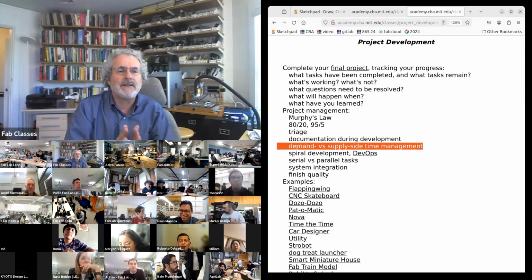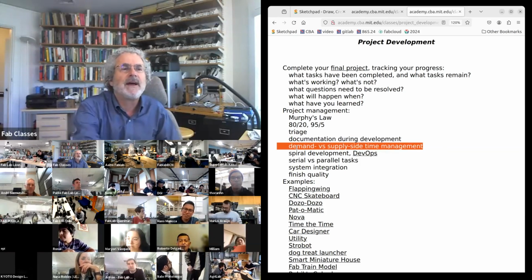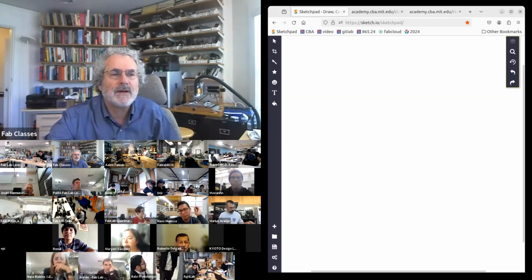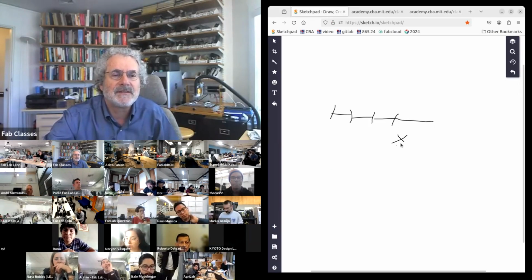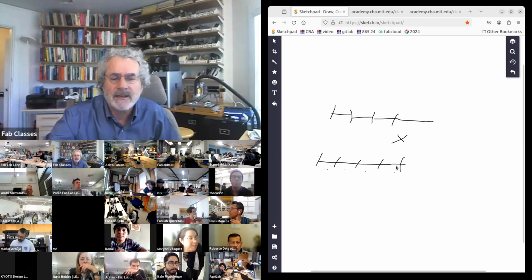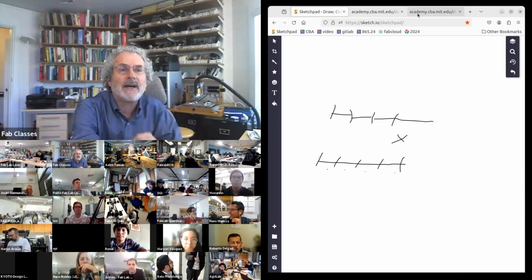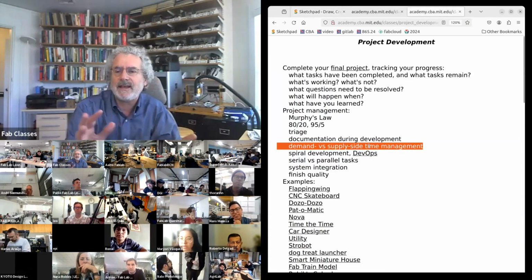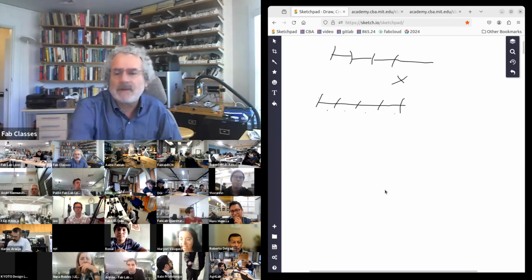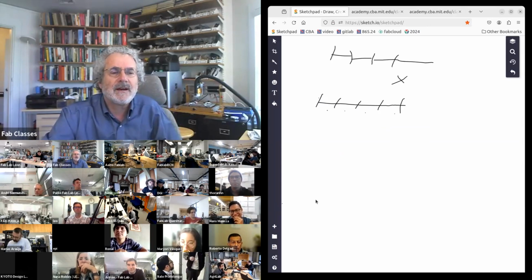Now you really, really need demand versus supply side time. If the final presentation was here and you're not done, the only way to do it is: we're here now, here's your presentation, and you have to divide up what you need to do each day to get there. And you need to do triage if you can't finish in a day, to cut back to what you need to do to finish.